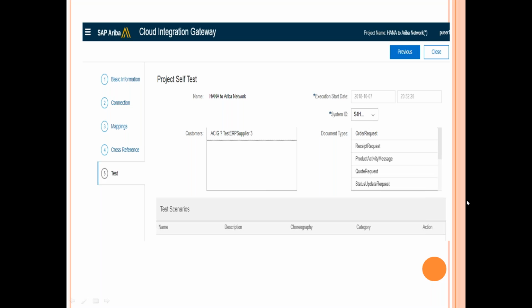Yes, open POs. We preferably ask them to close the PO rather than leave it open. If they want to replicate the closed POs, we do that. For open POs, we ask them to close them in ERP itself, which would be better. And contracts also will be uploaded, maybe something like five-year or three-year legacy contracts. That is always the pain point for every consultant in every project. Legacy contract migration is a lot of work basically.